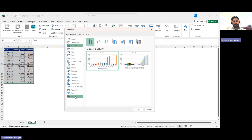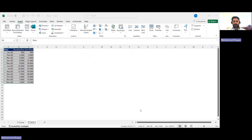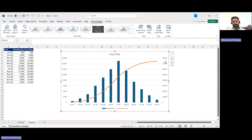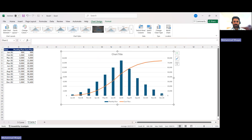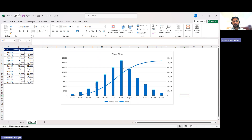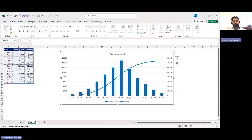In the Combo chart, there is a histogram and a line, but both are on the primary axis. I will move the line to the secondary axis — the reason is you can easily read where the cumulative line finishes, around 74,400. I change the colors to blue for both the bars and the cumulative line, so I know that blue represents planned values. I update the chart title to 'Concrete Cubic Meters', change the font to black and bold.